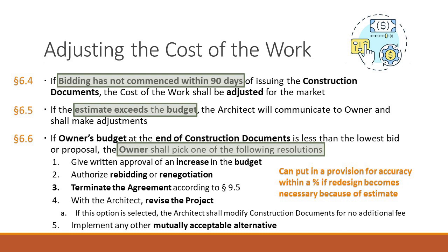You always told us we were under budget. In fact, they said we were about 10% under budget, which was kind of ironic, because we came in 18% over. And so we opted to revise our scope. As a result, the architect had to redo the designs for free. All the hours they spent fixing the scope to match the budget, because the bids were too high, the architect did not get paid for.